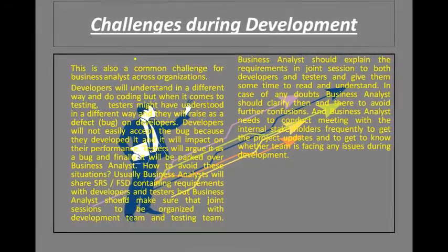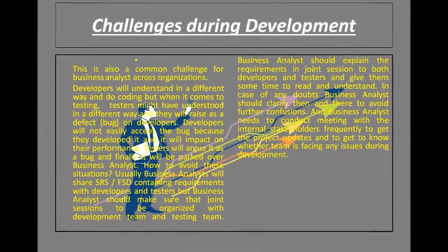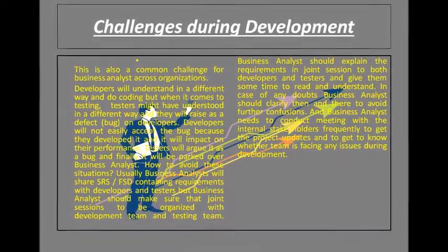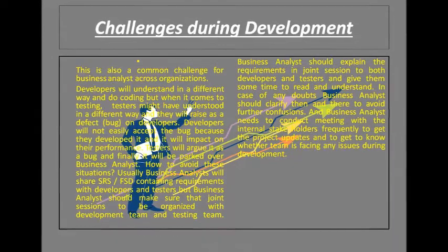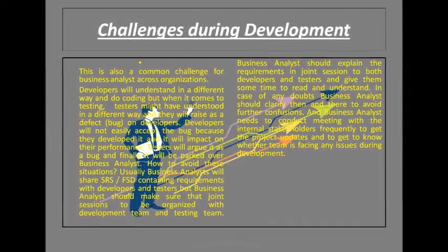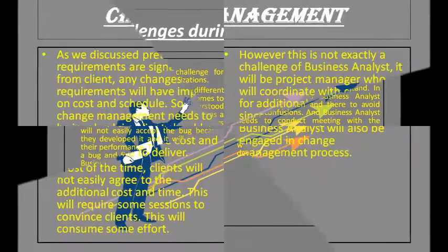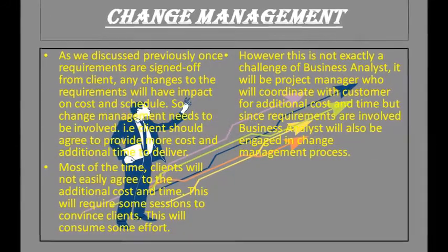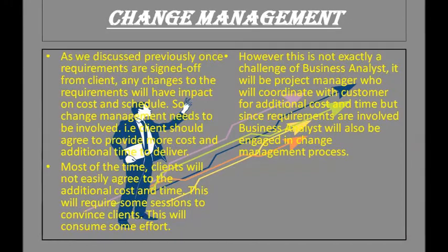However, in real time, we start following up with the client to get sign-off, and we will commit the delivery dates only once we get sign-off from the client. Unless we get sign-off from the client on the FSD, we will not start work on this project. It will happen rarely, but there is a chance of this scenario taking place.